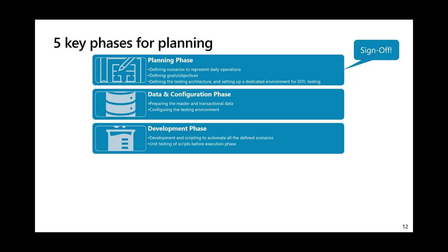We are doing the live testing, so that means we need to automate all the scenarios in the testing. We will not expect to trigger any scenario by menu, so we should expect the scenario to run in the system automatically with a specified schedule time in the system. During the development, you should complete many unit tests to make sure the scenario runs successfully and also mix all scenarios in the system together without any issue. You need to make sure all processes and scenarios run without issue and are well tested in the application before you perform them in the live testing environment.